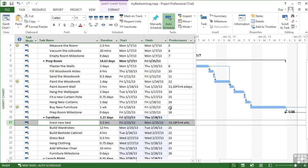So we've seen here two lags. One for putting the bed up. So there's an extra lag for the delivery of the furniture of four weeks for working weeks. And there's been a lag between painting the wall and plastering the wall for elapsed days. Four elapsed days in time, regardless of whether that's working time or weekends for the plaster to dry.